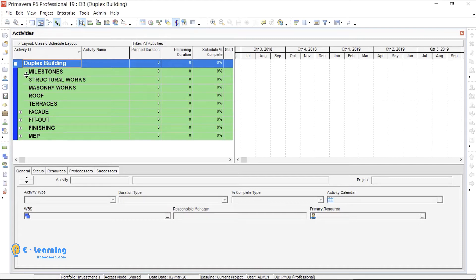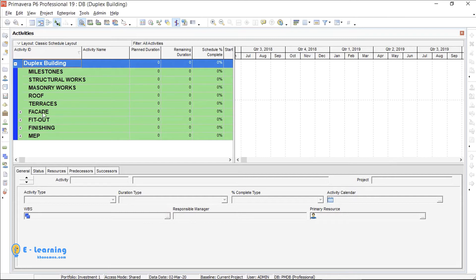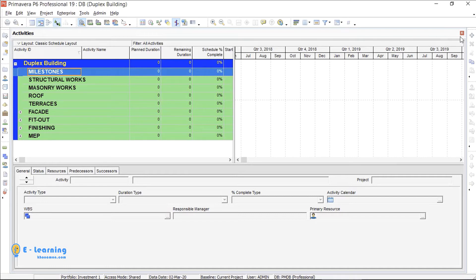You see all WBSs which I have created before. When I want to add activity, I select its related WBS, then press Insert or this plus icon.